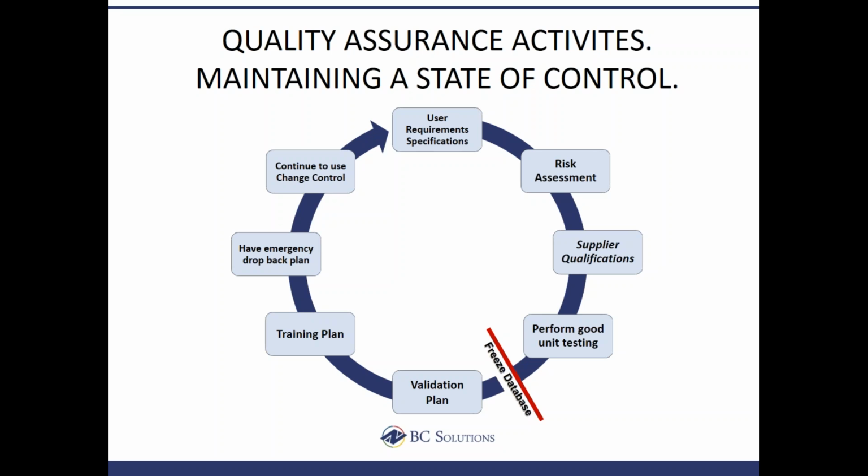And qualifying your vendor or your supplier is a very important piece of activity that you do to make sure that not only your vendor or your supplier, whichever you call them, has all of the functional aspects that you need in order to meet your requirements for daily work in the blood bank, but also to make sure that they've maintained their GMPs, or their good manufacturing practices.